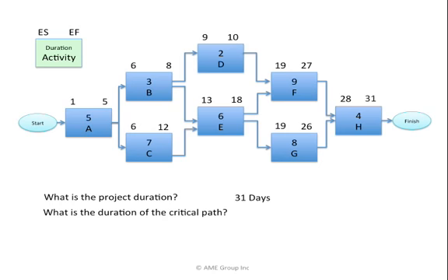The next question, what is the duration of the critical path? It's the same answer, 31 days. The critical path is what drives the duration of the project.